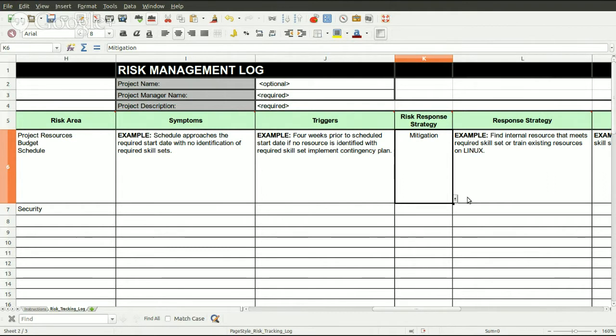Sometimes it's the worst because now you have more hands actually on the code, and maybe the organization is not able to handle so many software changes. They lack capability maturity model index, CMMI level 3 or higher, and they're unable to handle so many changes like that in that particular environment. And then also maybe the people they're throwing at it do not have the expertise needed to actually get the task done, and that schedule just may have to shift out to the right, or they may have to de-scope what they initially were trying to do.